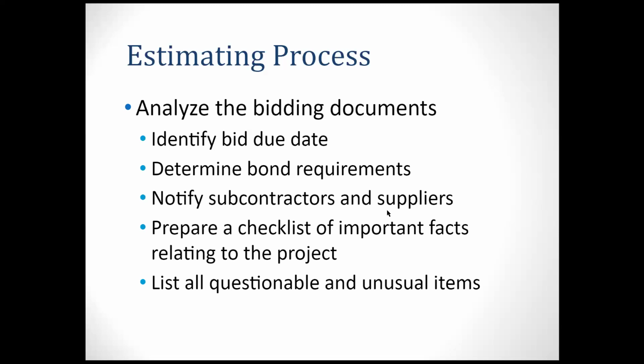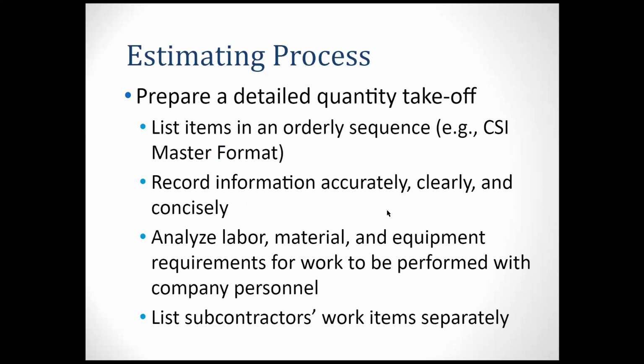You will prepare a checklist for the important factors related to the project, right? List all the questionable and unusual items. The questionable things, unusual things, you can clarify with a pre-bid meeting with the owners or the design teams, right? So you will prepare a detailed quantity takeoff.